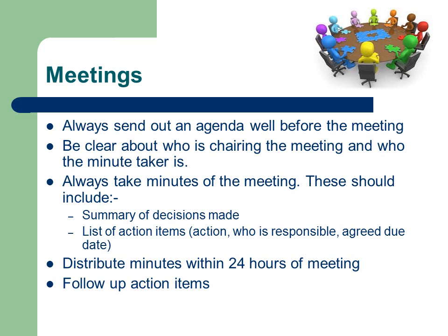This slide is a reminder about meeting protocols. Always send out an agenda prior to the meeting. The agenda should list all items to be discussed and may have proposed timings against them. This helps the chairperson to keep the meeting on track and avoid going over time. Items requiring additional discussion should be taken offline and discussed in a separate meeting. Be clear about who is chairing the meeting and who the minute taker is.